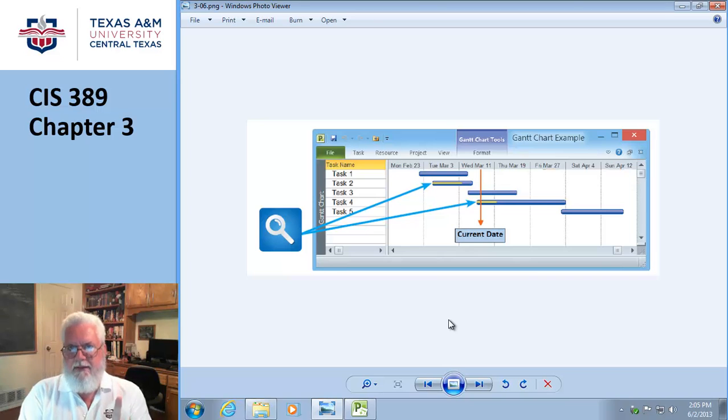You either have a start date and it's going to take this long, or an end date, it has to be done by this time, and so you back the schedule back. Rarely do you provide all three because it doesn't provide you any flexibility. If you had a start date and a duration, if you change the start date, it just moves over, right? No big deal. And if you had an end date and a duration and the end date changed, then everything just slides back and forth.